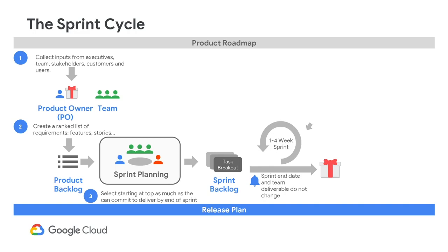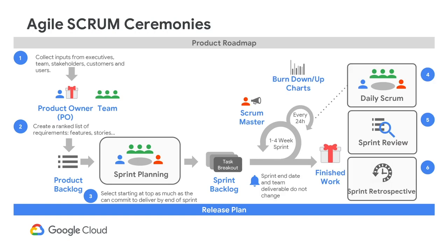At the end of the sprint, the user story should be completed and ready for go live. Anything not finished will be carried over to the next sprint or placed back to the product backlog. This sprint cycle repeats itself again. Throughout the sprint cycle, the Scrum Master is the coach and tracks the team's productivity through burn down and burn up charts to measure the team's progress in the form of velocity.